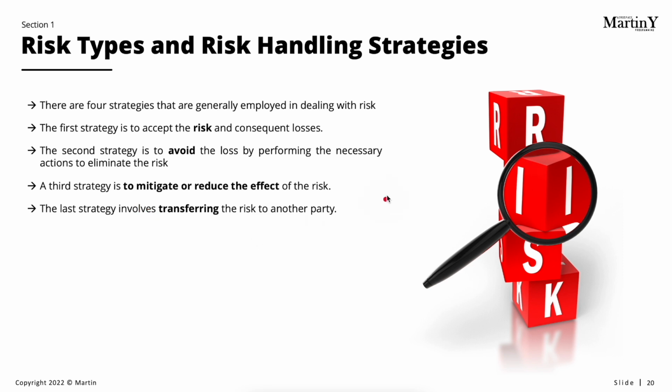Obtaining insurance against a specific risk does not actually prevent the risk from occurring, but it provides financial reimbursement to make up for the loss of the risk that occurred. Risk transfer works well when the risk is associated with financial loss. However, sometimes the risks are not associated only with financial loss, but also with losing information.